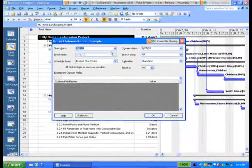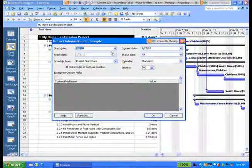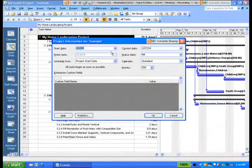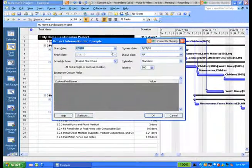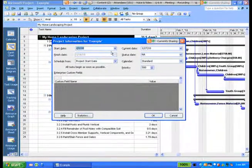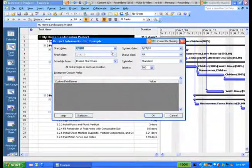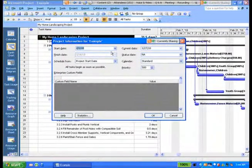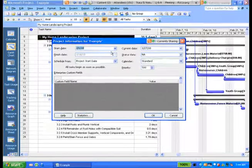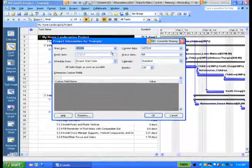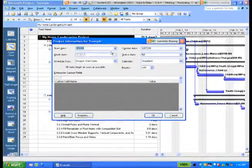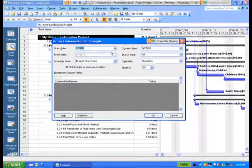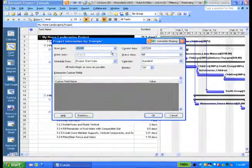You can set your start date to be in the past. You can set it to be in the future. Oftentimes, we get a project and we're still in the defining mode, and so even though the project started a month, two months, a quarter ago, we have to figure out where we're going to have that essential project start date. And the rule of thumb here is you start a project when you start actually developing it. So if you're trying to capture the cost of planning and capture the cost of defining, then your start date might be earlier than the actual work to create the deliverable, whatever that might be.